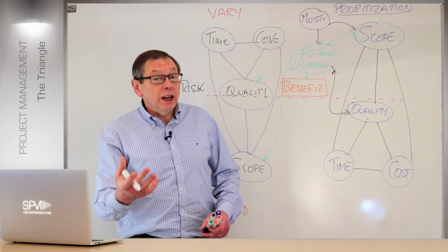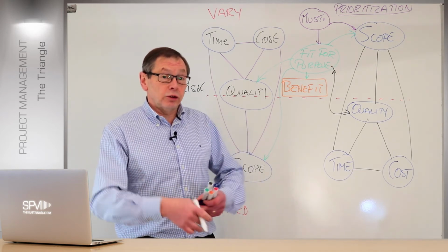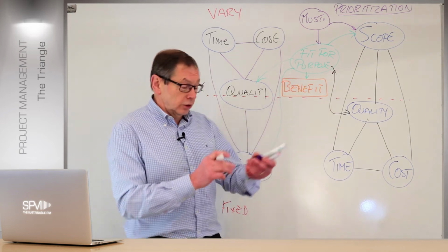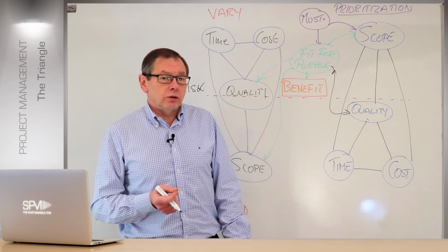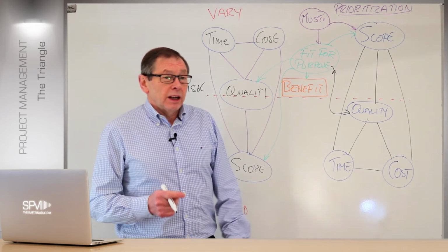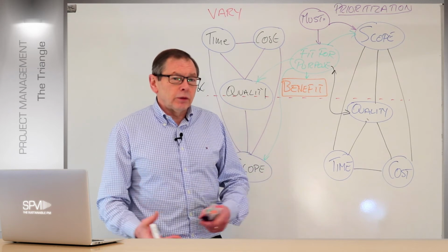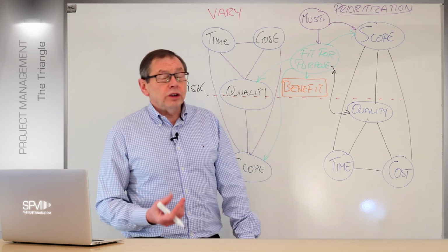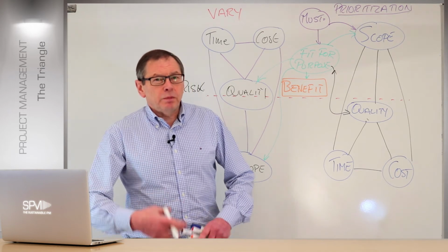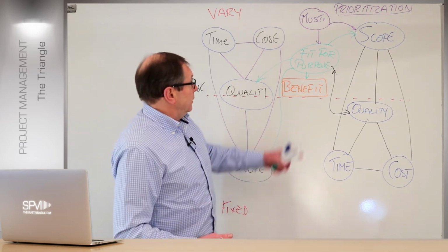Now, of course, that could change. Remember when we talked about the 5 characteristics? That can change throughout the project. The scope could change a little bit and a lot. We'll talk a bit more about how Moscow works and this type of prioritization in general in another session. Okay. So the must-haves are there to start with. Now, a lot of elements have what we call should-haves. Those sets of requirements, products that we ought to get across the line. Without them, it will still work, but we can have a workaround. So it's painful to leave out. Okay. I'll look at that in a more simple diagram in a minute.